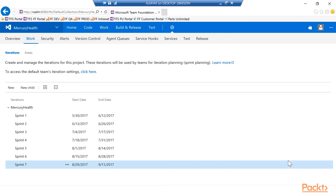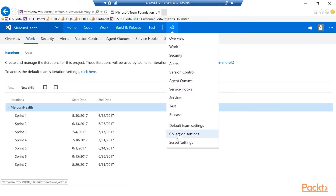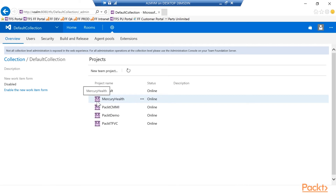Now let's add people to the project so we can set their capacity and start working in the sprint. I'll go back to the gear icon and hover over it to go to Collection Settings. You'll need higher-level permissions here — average developer permissions won't get you into collection settings. To create teams you need collection administrator type permissions. Make sure you work with the right person to set up teams, because once they're set up you don't have to redo them.